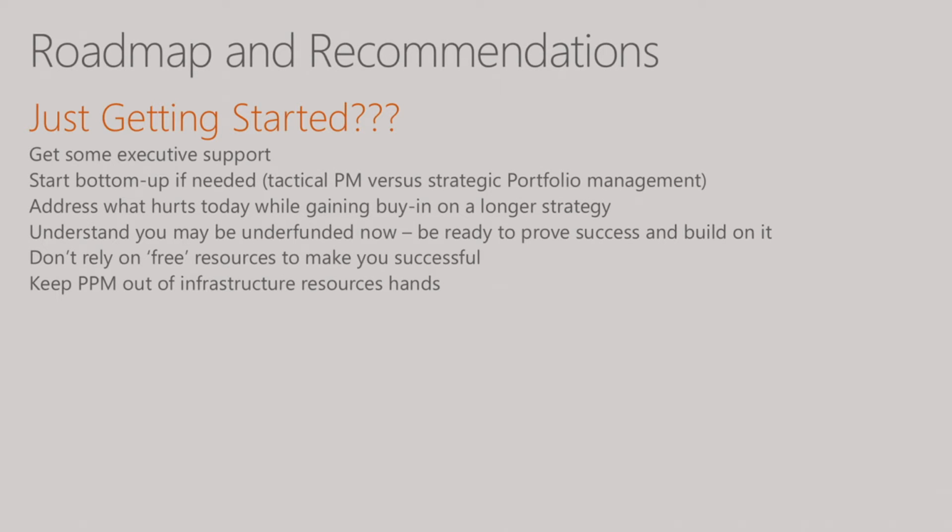So if you're just thinking about getting started, if you're on Project Server today, a lot of organizations have said, hey, how do I migrate to Project Online? A lot of companies we work with have kind of drawn a line and said, we're going to keep all of our old data in Project Server, and starting January 1st, that's going to be our live Project Online system. And they take that database, their Project Server database, and they use it as an archive.